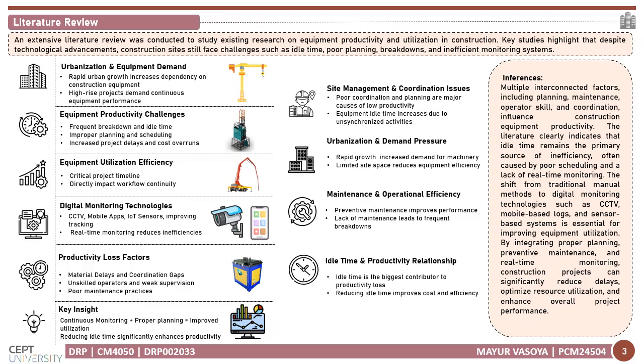Another important theme is productivity loss factors. Literature identifies material delay, coordination gap, unskilled operator, weak supervision, and poor maintenance practice as interconnected. For example, if material is delayed, equipment becomes idle. If coordination is weak, the operator may not receive clear instruction. If preventive maintenance is not done, small technical issues may become major breakdowns.